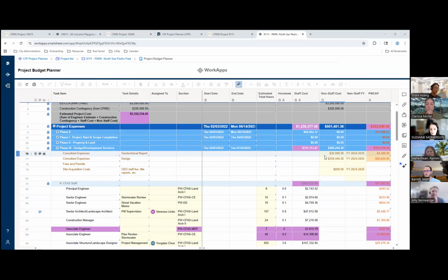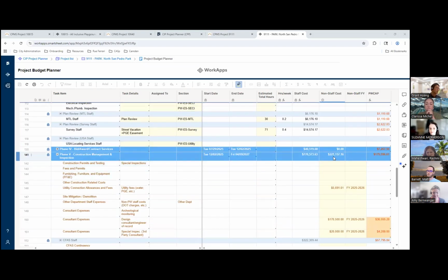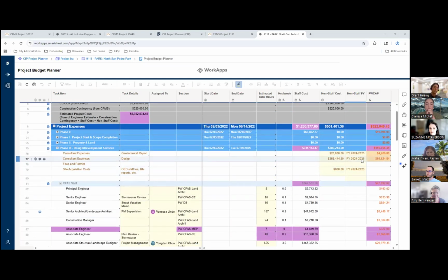As I mentioned before, it's best to split this up if it's going to be split into different phases. If the consultant provides multiple tasks in their service order that identifies the budget within phase 3 for design, or bidding and award support, or construction administration services, make sure you put in that amount for each of the phases, such as down here in phase 4 and phase 5. In addition, make sure you enter the dropdown of the fiscal year, estimated on when that amount is going to be spent.